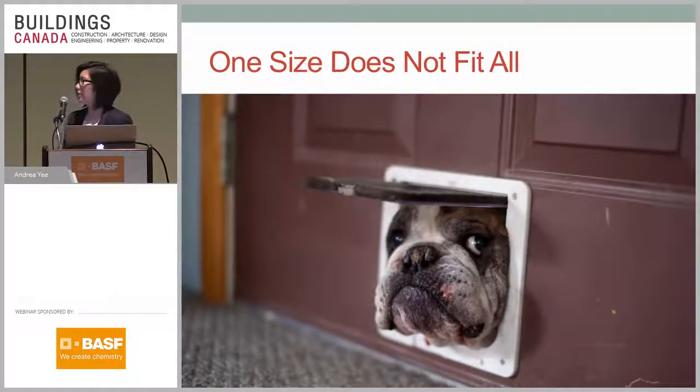And we're just wrapping up here, but I think we've already talked about the commissioning process and what it is, but it's important to recognize that even though it sounds like a daunting process, I know it sounds very costly, I'm sure, as I've described it. It's important to recognize that one size does not fit all. For a simpler project, it's very possible to engage in a much simpler scope for the commissioning process. You obviously don't need to review every single submittal for a basic brick building with punch windows. It's technology that we understand, fairly straightforward construction, lower risk. And so it's important when owners are developing a scope for the commissioning agent to review the risks and then tailor the scope for the commissioning process to fit that particular project.